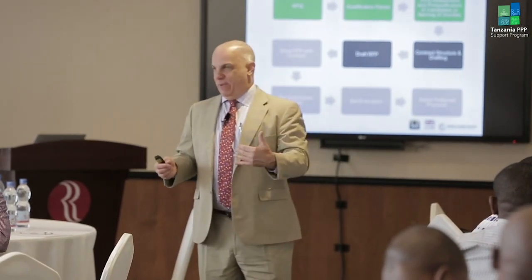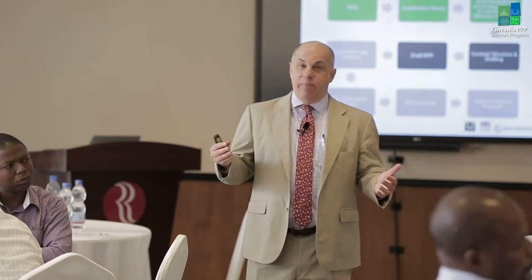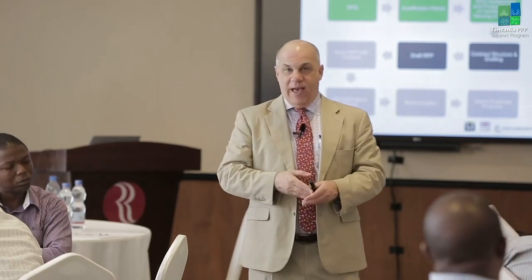And I speak from experience. I learned from my own mistake. I had a project where we waited until we chose the winner, a very good company, and then we started negotiating the contract. Well, in hindsight, they kind of had us over a barrel. We had chosen them, and they knew that for us to abandon them and go back, after putting all this time in negotiating a contract with them, that means we're going to have to start it over with whoever came in second. It was a mess.